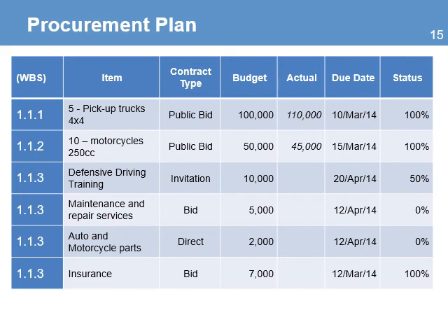This plan is also a monitoring tool to review the status of all the procurements in the project. It is used by the team on a regular basis to monitor if any order is on time or is delayed. If there are any variations from the plan, you need to identify the causes of the problems and make the necessary changes.